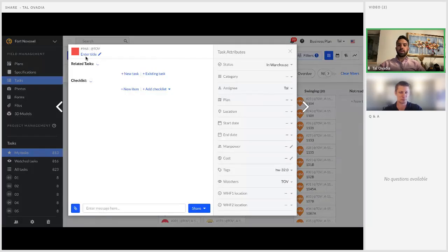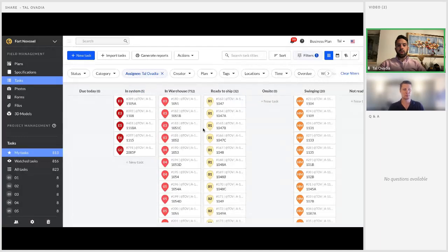That is possible. So depending on the nature of the tasks that you're putting in, you can create a new task and you can give it all of these particular attributes or anything that you want. But what we do is basically we do the work ahead of time in Excel. We're getting submittals, door submittals for the doors and the hardware from the supplier. And we do work in Excel to prepare it in a format that can be imported smoothly into Fieldwire.